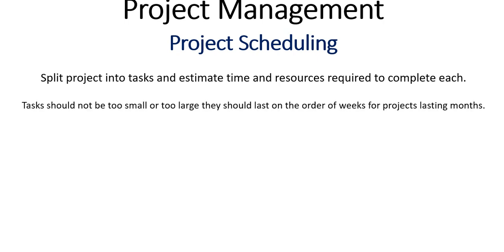Tasks should not be too small or too large. They should last on the order of weeks for projects lasting months. So you may decide to say, I want to work with weeks or I want to work with months, depending on the size of your tasks.